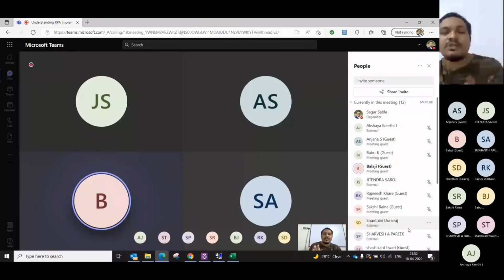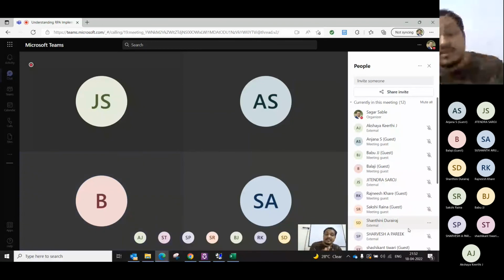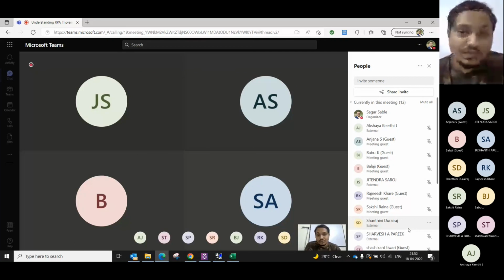After that you will tell them that your process has these many applications, you require this access, and you need this data, can you please make it ready for us. Then you start developing the design, then you start developing the actual workflows, and then comes UAT. Now you have the idea what you have to do, where you have to start development, where you have to start testing with the user, when you have to connect with the user and when you don't. Understood?